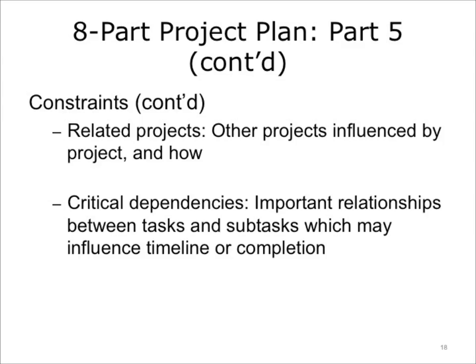Related projects: other projects can be potentially impacted by your project, and other projects may be dependent on deliverables associated with your project, or your project may affect the parameters of other projects. You should address these issues and ensure managers of related projects are kept in the communication loop. Critical dependencies: it is also essential that the critical dependencies between related tasks and subtasks, whether internal or external to the project, be understood to ensure that tasks are sequenced correctly so you can maximize efficiency and minimize unwanted downtime.